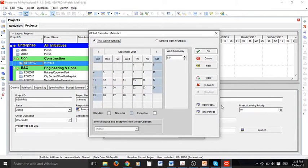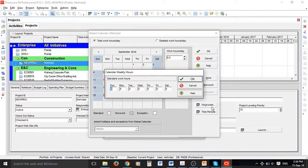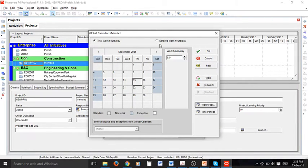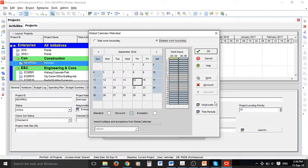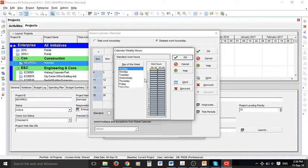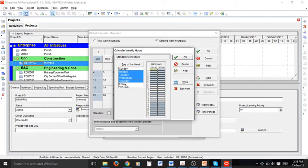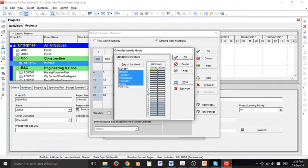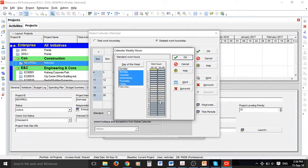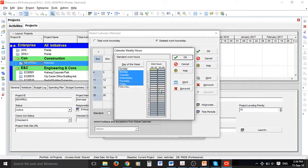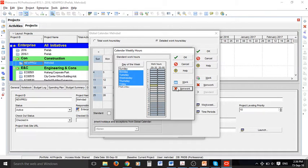So we can do a number of things in here as you can see and we can select detailed work hours. In the workweek, for example, we can select Monday to Friday. By holding a control button you can select multiple days of the week and if you want to change the hours you can. By default it is 8 to 12 and then 1 to 5.